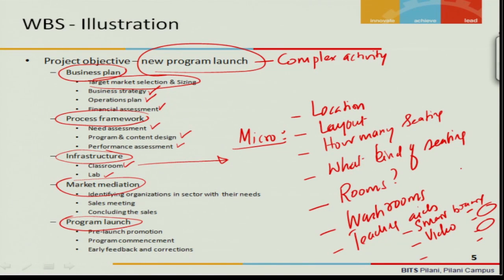So when you get into more and more detailed activity like taking the quotations from various vendors, placing an order, expecting it from the order, that is the lead time for delivery, etc. When you keep identifying all these micro activities and assigning timelines for each one of them, when you add up all these times, you will create a complete network diagram which will give you as to what will be the total project lead time.